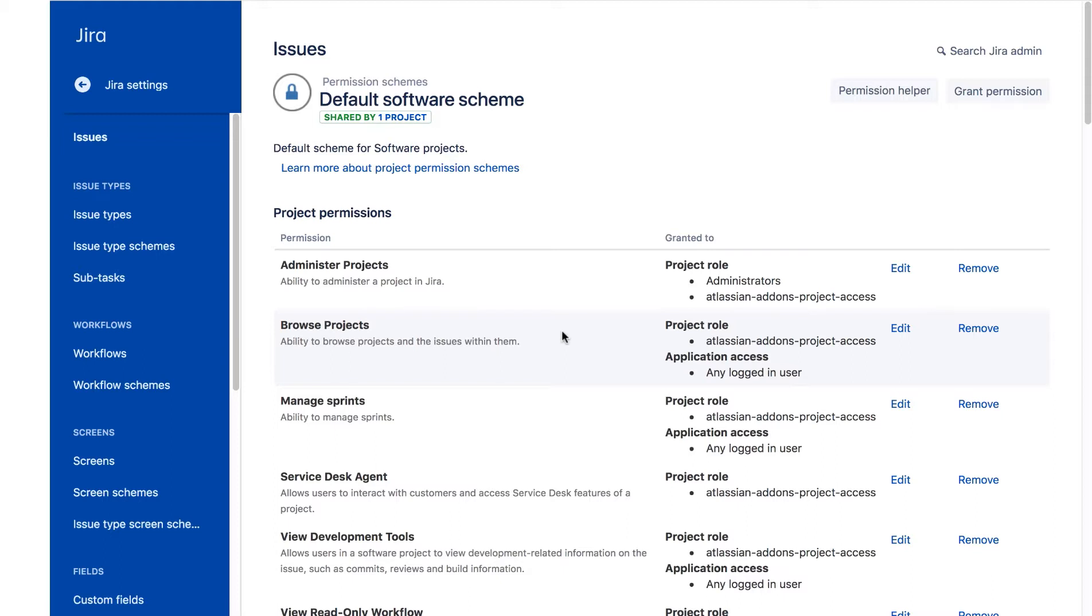The default permission schemes in JIRA have an open approach to accessing the projects and issues. If your organization doesn't want to provide that much access to projects, as the JIRA Administrator, you could edit this scheme, but changes will apply to all new projects. The Atlassian add-on's project access role enables products that extend JIRA to have permission to do their work.